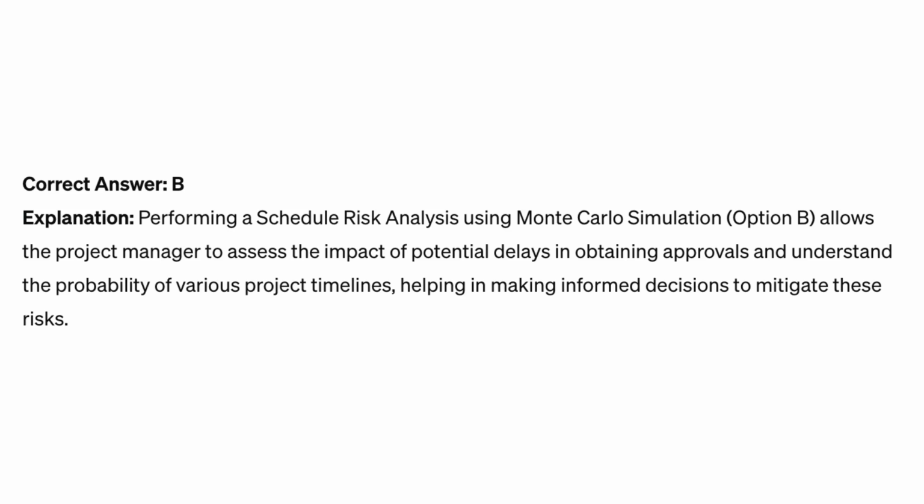Correct answer B. Explanation: performing a schedule risk analysis using Monte Carlo simulation. Option B allows the project manager to assess the impact of potential delays in obtaining approvals and understand the probability of various project timelines, helping in making informed decisions to mitigate these risks.